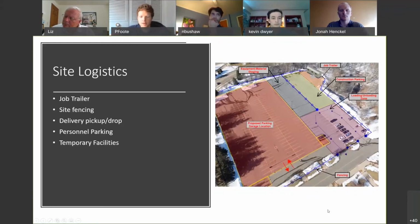So we have created a project logistical plan in preparation for the beginning of construction. And as our project progresses, it's projected that this layout may have to be adjusted and changed according to the phase or current activities on site. We have focused our layout separation to provide large enough space for all of our incoming equipment and materials, but most importantly, to accommodate the workers and our staff to ensure safe distancing from potential hazards and equipment while in operation. We found this layout to be the most practical in terms of overall coordination and workflow, as well as safety.